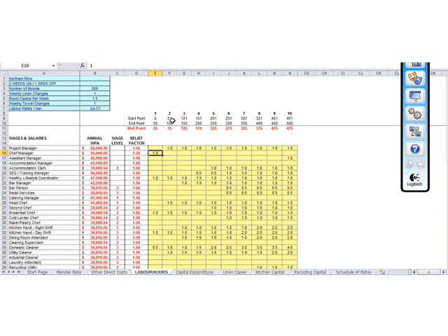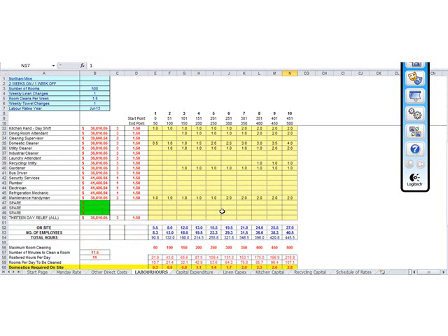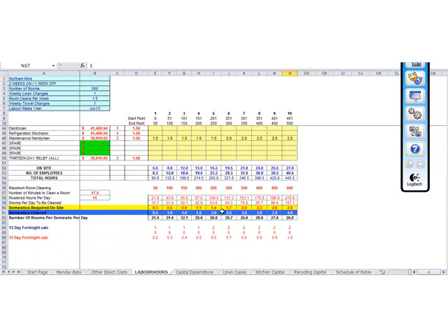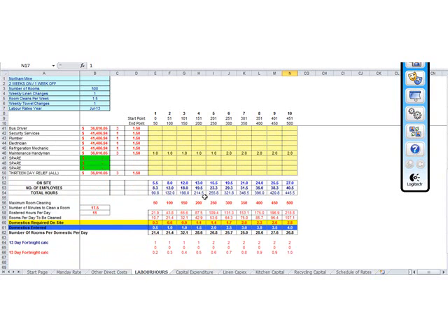The next increment is 51 to 100. They said, yep, we definitely want a project manager there then, and all the way through to if there was up to 500 people on site. This team's worked through. They've decided they would only need an assistant manager here if there was 451 to 500 people being accommodated on site. So you can see this group has just put in things the way they think they should be, and that's fine.